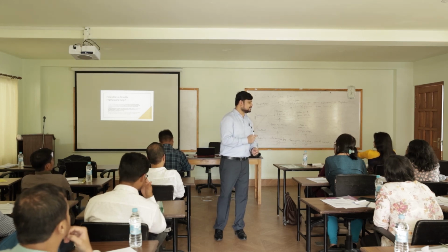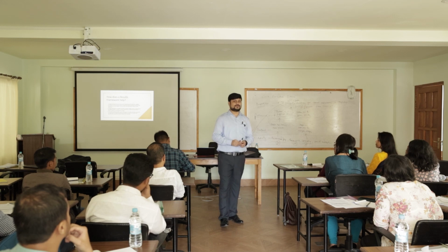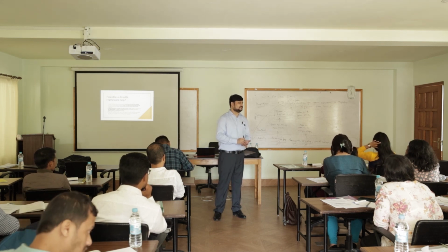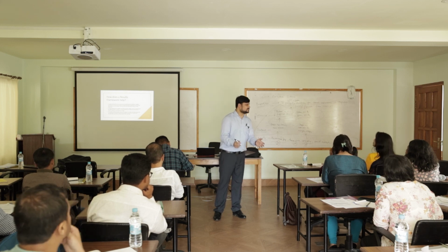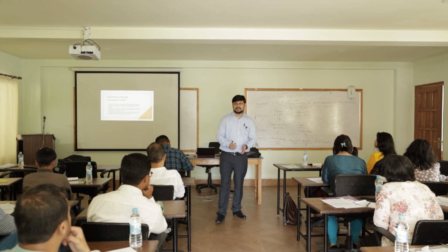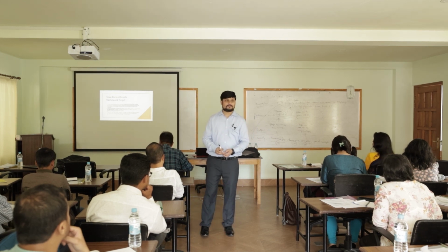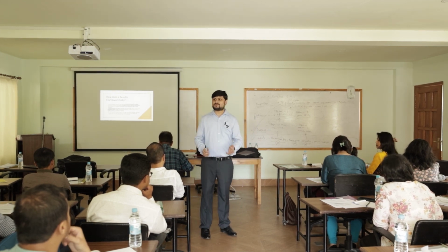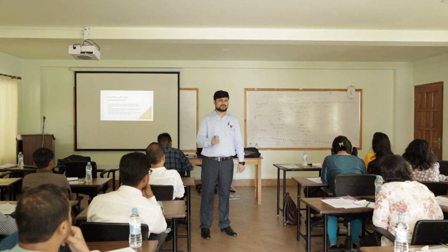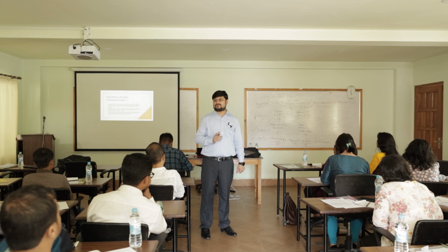Because at the initiation of the project, obviously you know for sure that there'll be a lot of human resource that will be onboarded, recruitment and everything, and their capacities also need to be built. They need to be aware of what we are going to do as a part of the scheme of this program, right? So maybe in the first month they are able to conduct only 10 counseling sessions, and that is a more possible scenario for them.